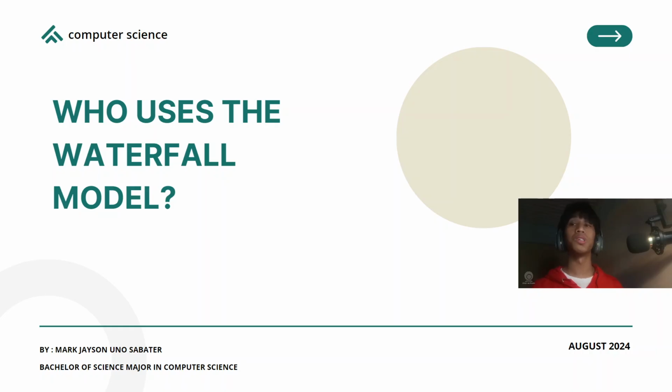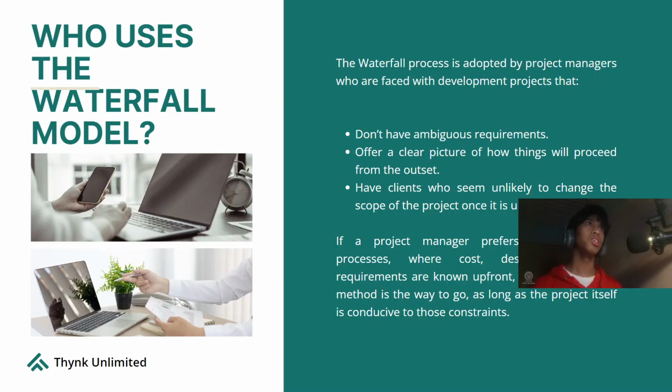Who uses the waterfall model? The waterfall process is adopted by project managers who are faced with development projects that, first, don't have ambiguous requirements, second, offer a clear picture of how things will proceed from the outset, and third, have clients who seem unlikely to change the scope of the project once it is underway.